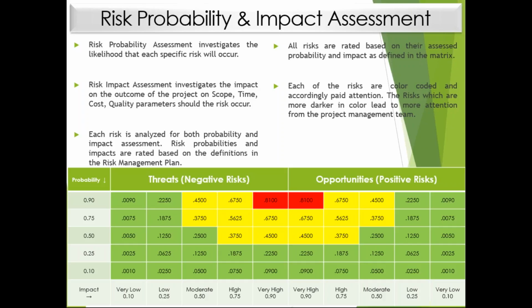Now, the one which is featuring in red, I might want to control it as a project manager. One featuring in yellow, I might want to delegate it to my tech leads. One featuring in the green, I might want to delegate it to somebody else, right? So who is monitoring what is also governed by what is the assessment of the risk.